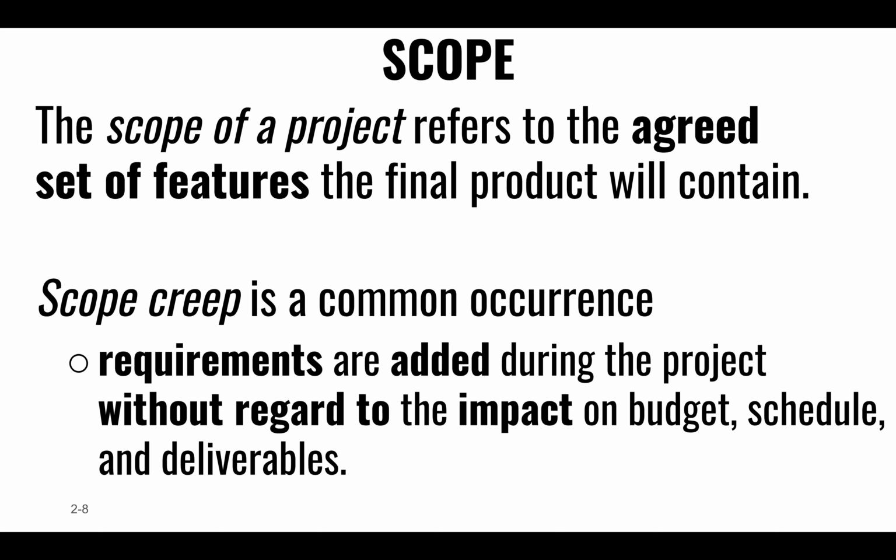When this list keeps growing, this scope of things that we're going to be doing, typically we refer to it as scope creep, right? At some point we try to settle on a particular body of things that we need to do, and when we thought we agreed that this is what we're going to be doing, as we progress, slowly but surely, things keep getting piled on, right? New and new things are being piled onto this list, and we're still being asked to deliver by the end of the year, right? But more and more things are being asked of us, but the resources don't seem to grow any further.